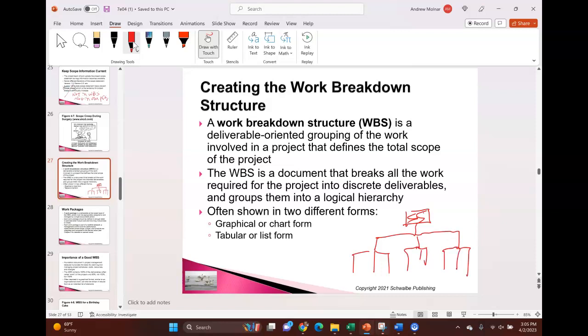Okay, so say I'm going to build a bike, right? And my scope statement is to build a bike that's for sale at Walmart, not super high end, but good enough, and kids can just enjoy it around the neighborhood, right? Well, to do that, I'm going to need a front steering mechanism. I'm going to need a frame mechanism, and I'm going to detail that out and what's required to build it. I'm going to need tires, right? I need a front tire, I need a rear tire, and some other things that go with it. And that's how I end up building my scope, my work breakdown structure.